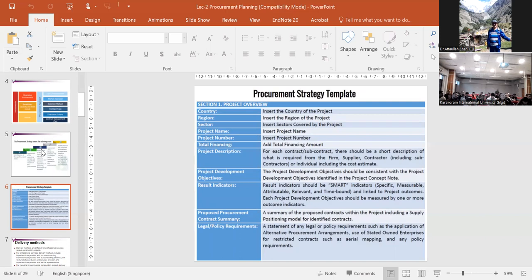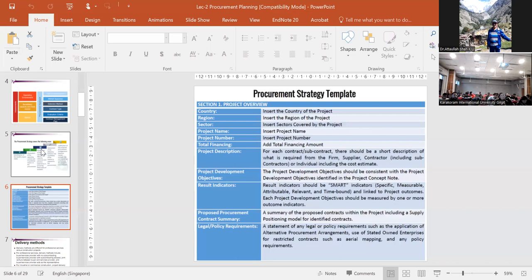For each contract, there should be a short description of what is required from the firm, supplier, or contractor. The project development objective should be consistent with the project concept note as defined in the PC-1. The result indicators - how you identify results - we normally use results-based monitoring. SMART indicators must be specific, measurable, attributable, relevant, and time-bound. Each project development objective should be measured by one or more indicators. The procurement contract summary includes proposed contracts within the project, including the supply positioning model.